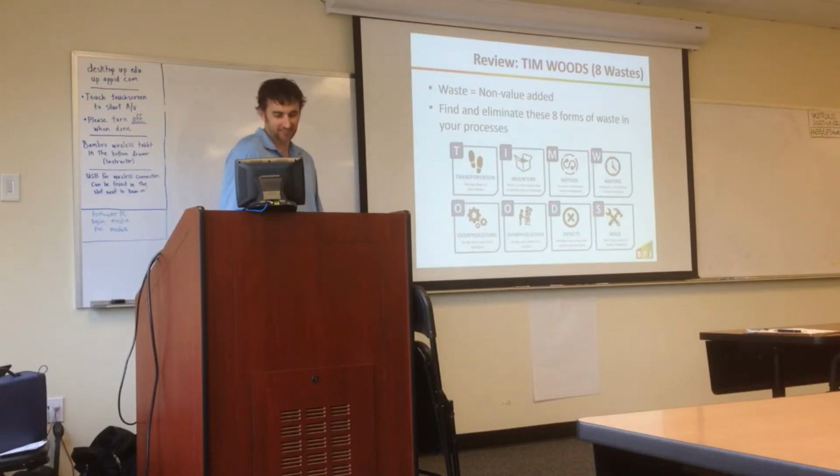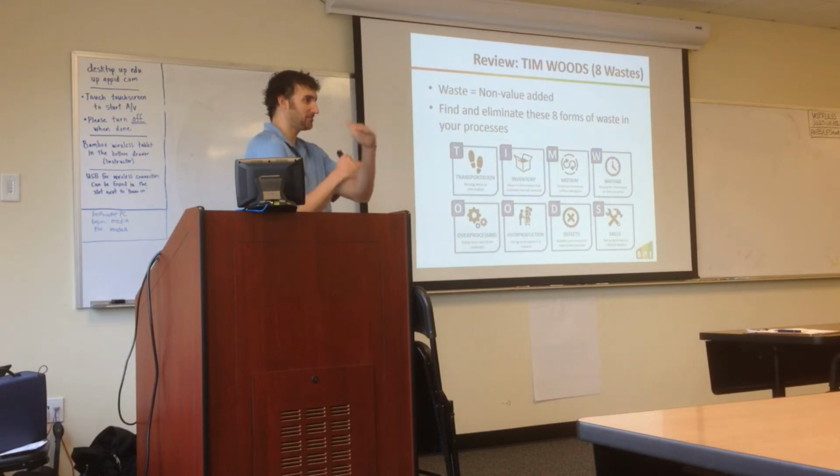And a lot of the things that get into that is, you know, I'm waiting for something to go out, and I'm going to start working on something else to keep productive. And at some point, a trick is where do you draw the line and say, I'm not going to start anything new. I'm going to go back and micromanage these 7 items or 10 items or 5 items or 3 items.